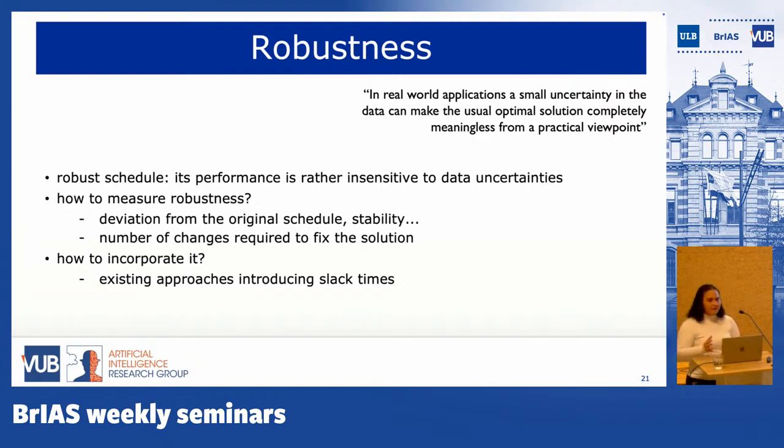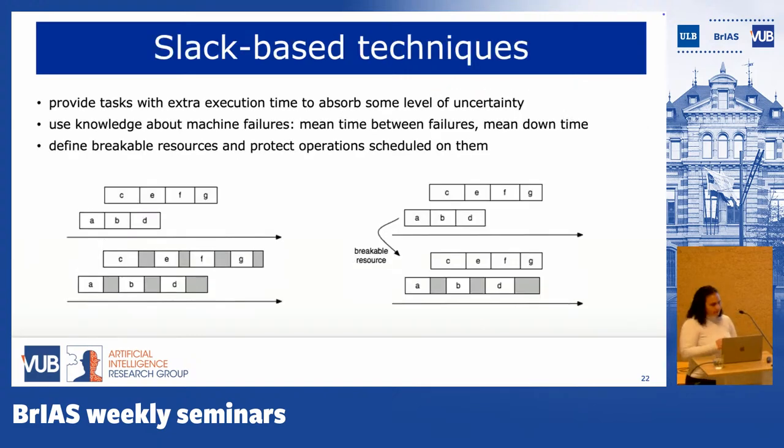But why is the airline then planning a bit more time? Because, of course, you need to take into account that boarding does not always take the time it should. You should take into account the air traffic, also in the landing, or maybe the plane has to arrive from somewhere else before you actually take it. So even airlines are doing this by introducing slack time. The idea behind these techniques is to provide the tasks with extra execution time, which can be used to absorb some level of uncertainty.